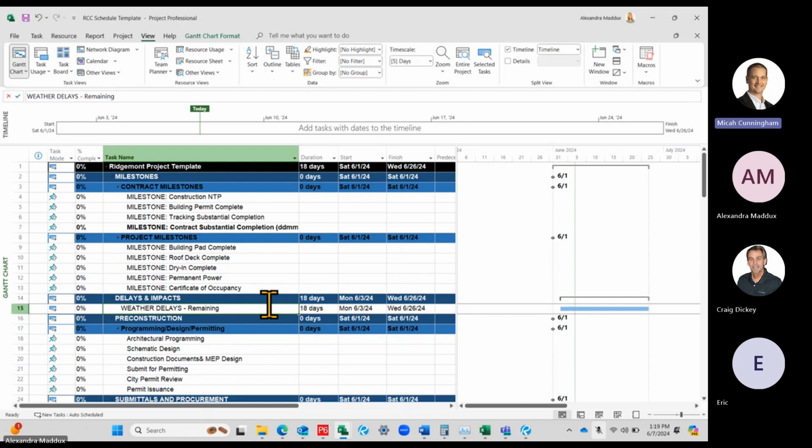So you have activity, weather day, activity, weather day, and then you're taking 3 days off the bank. So now your weather bank is only this long. These 3 days are gone because now they're here. Does that make sense? Does that help? Okay, awesome. Once we update, as we get into the training, I think it'll make a lot more sense. But it's so important to have this, because if you don't build enough and you only give yourself a 5-day weather bank, well, now you've already lost all this time. It's already makeup time you're not accounting for.